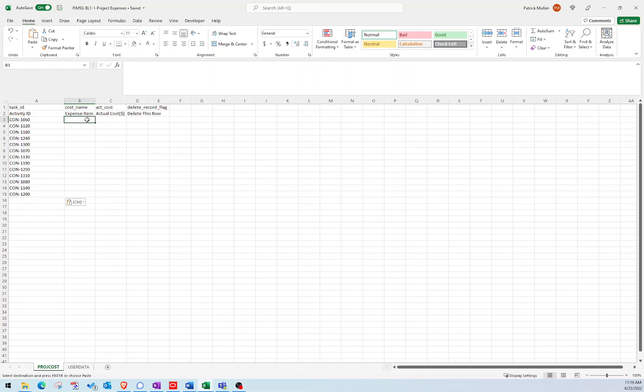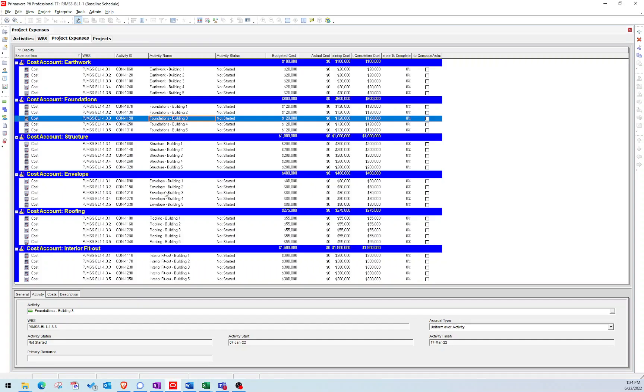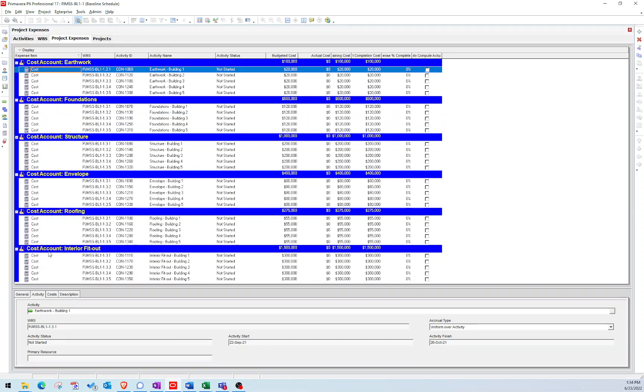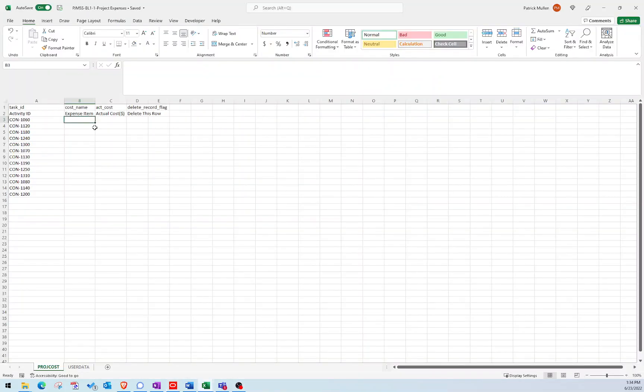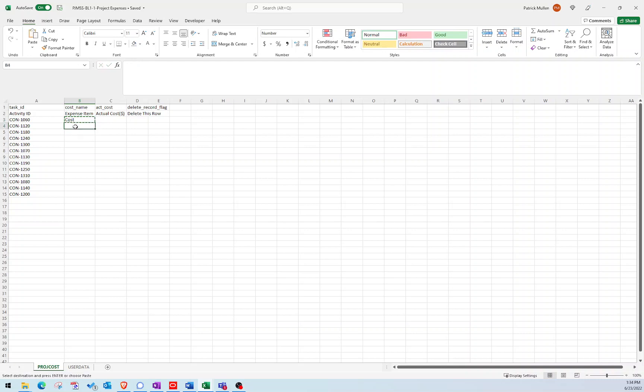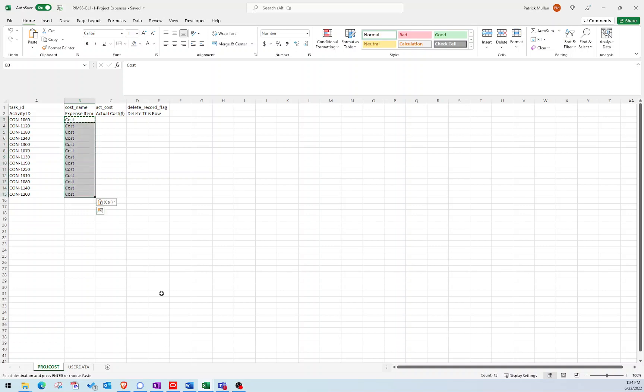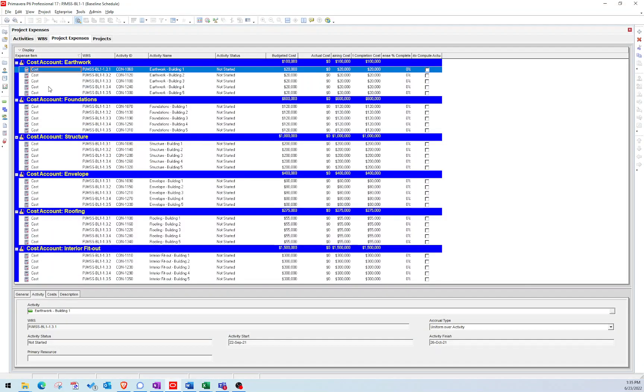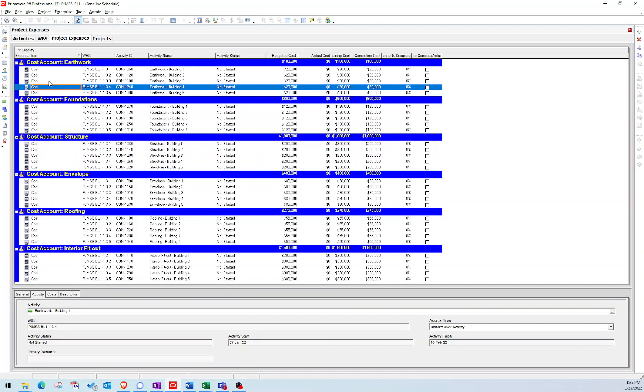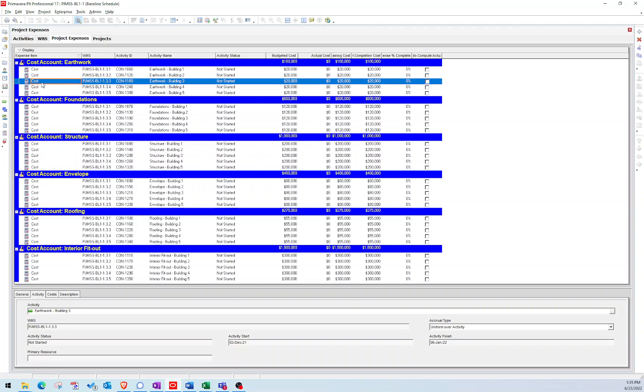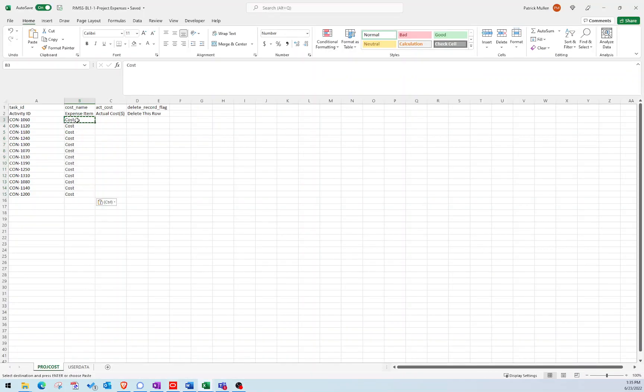The expense item, you have to clarify what the expense item is. Because our expense item, if we go back to our schedule, we can see the expense item name on all of these is called cost. We also want to match that on our spreadsheet. So we'll just call this cost and we'll copy that down. You can obviously name the expense different things, and we just want to make sure that we're matching whatever it is that we're wanting to import to. Because if there's a mismatch, then it's not going to know which expense to match it to when we run the import.